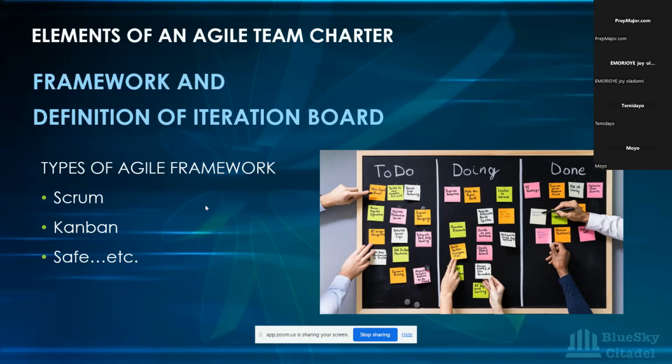If work is always coming, in that case you just have to use a Kanban board, because you always have new issues every day and your customers will not really want to wait for 2 to 4 week sprints to get what they need.